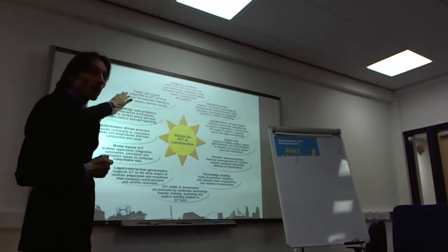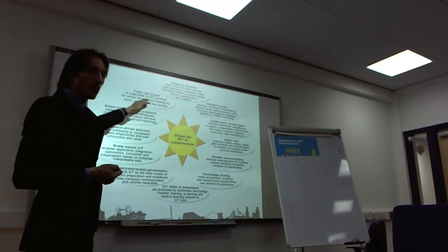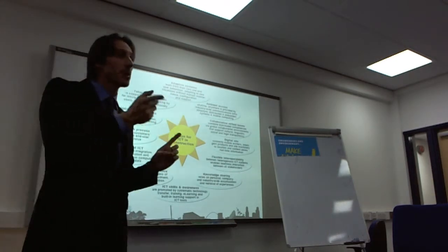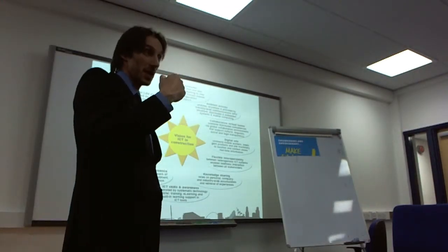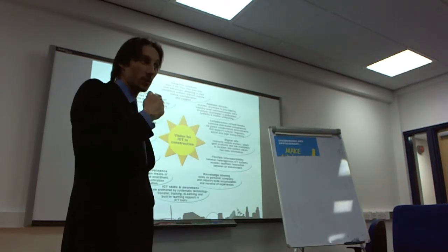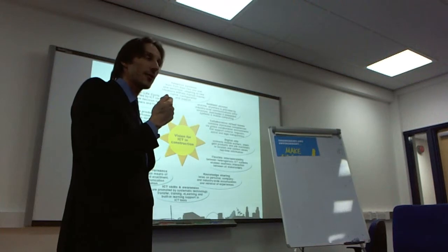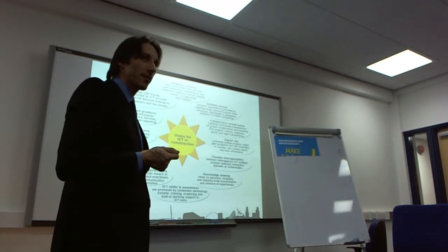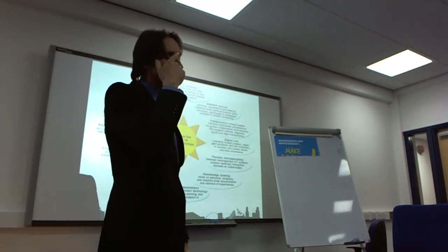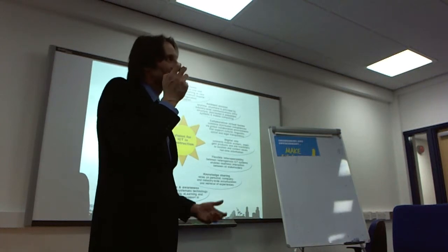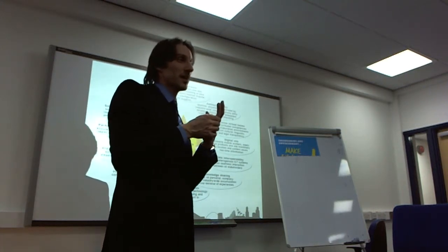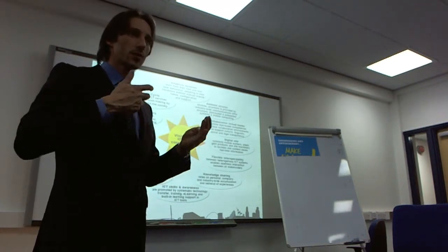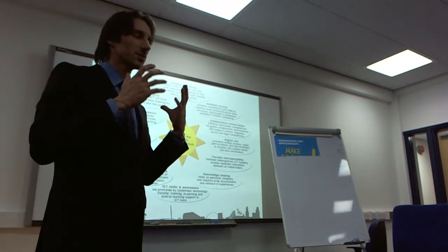So what are the boundaries? Where do we say that our project is complete? We've seen design and build as one of the options. So you give me the money, I will make the design, and I'll construct the building. I'll take some risk for it, but I will manage to be more efficient than my competitors. But what you're really interested in is not that. What you're interested in from a building is probably your life in the building.